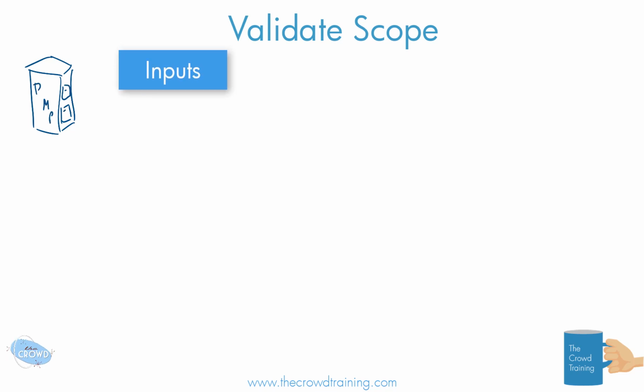So the project management plan, and that could be the requirements that we had planned for, the scope that was required. Anything that's in the plans that we need to check and verify, okay? So we're validating that the work was done. But we also need various other project documents, like maybe a requirements document that lists out a traceability of who's to do it and why and how come, and anything else that we might need to look back on and to check.